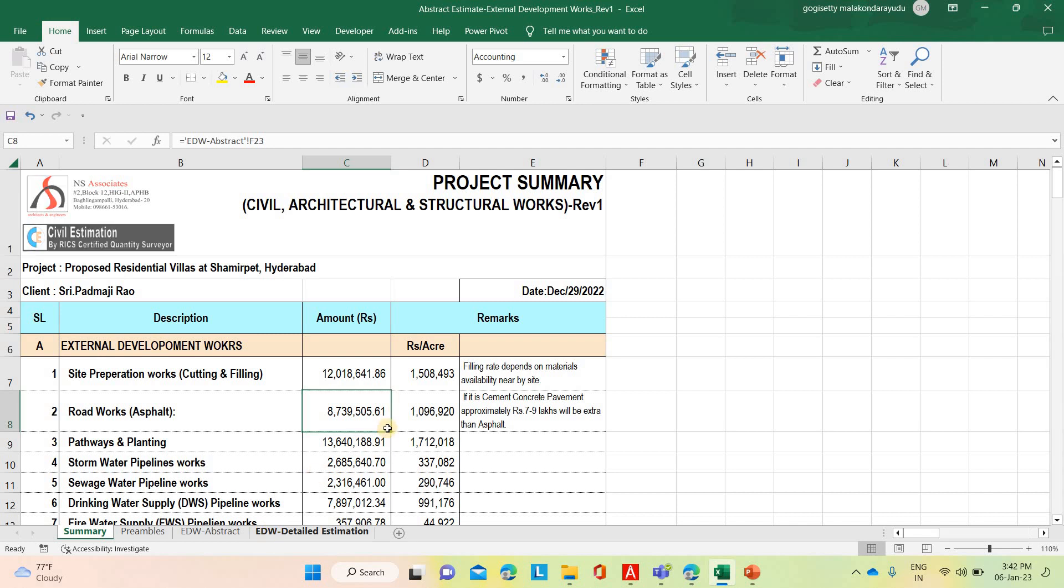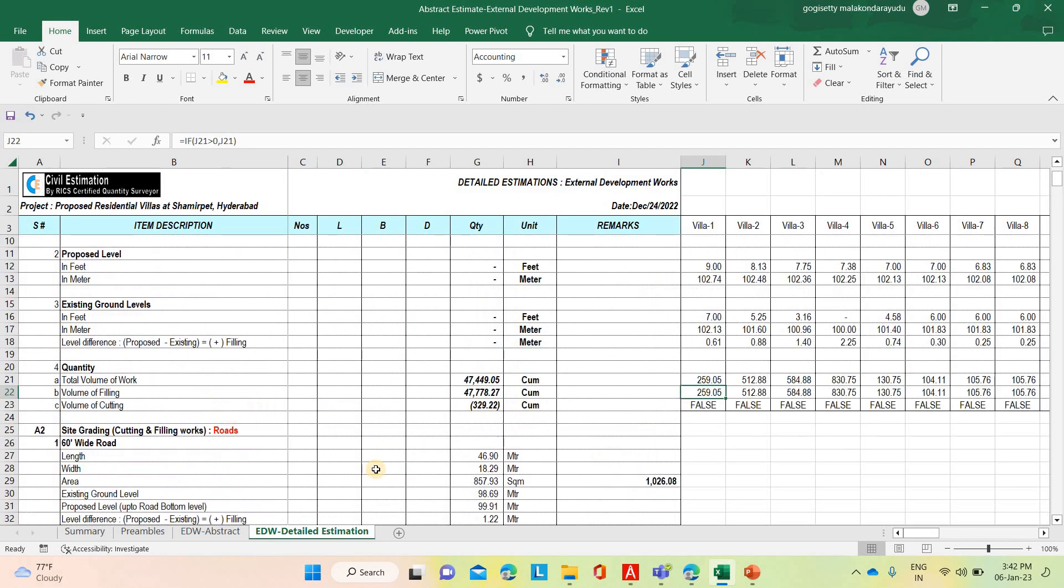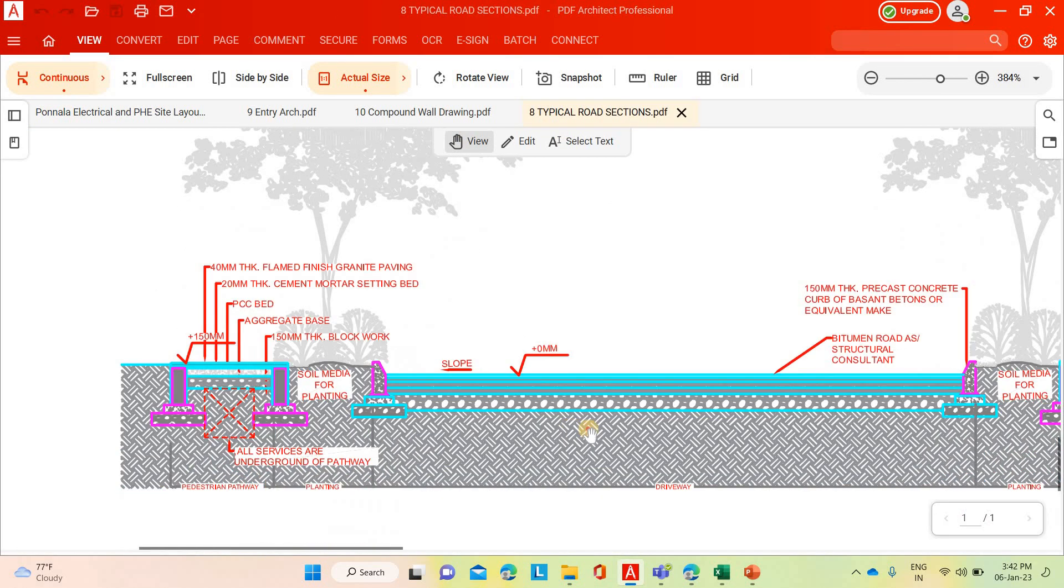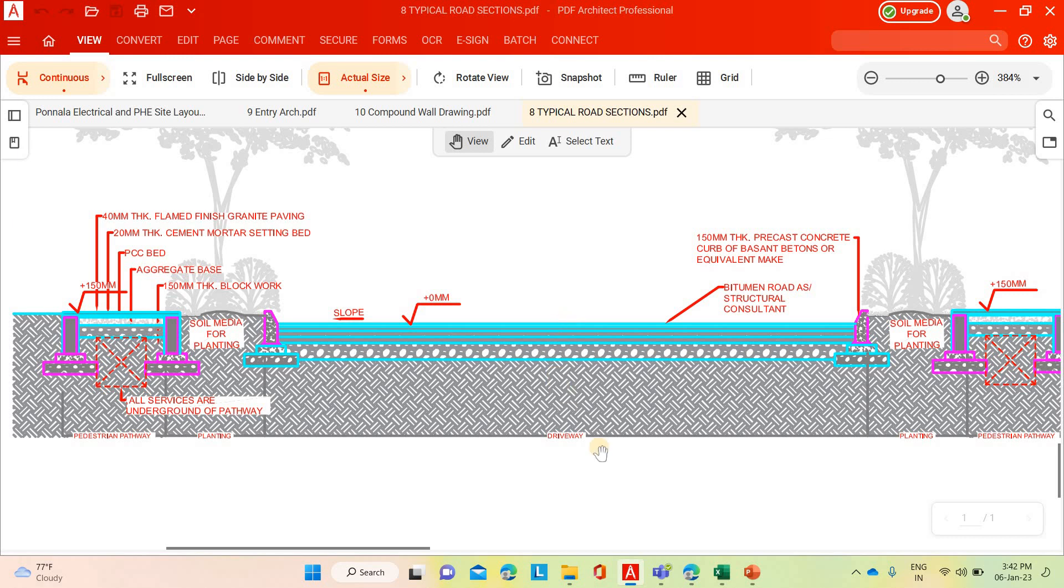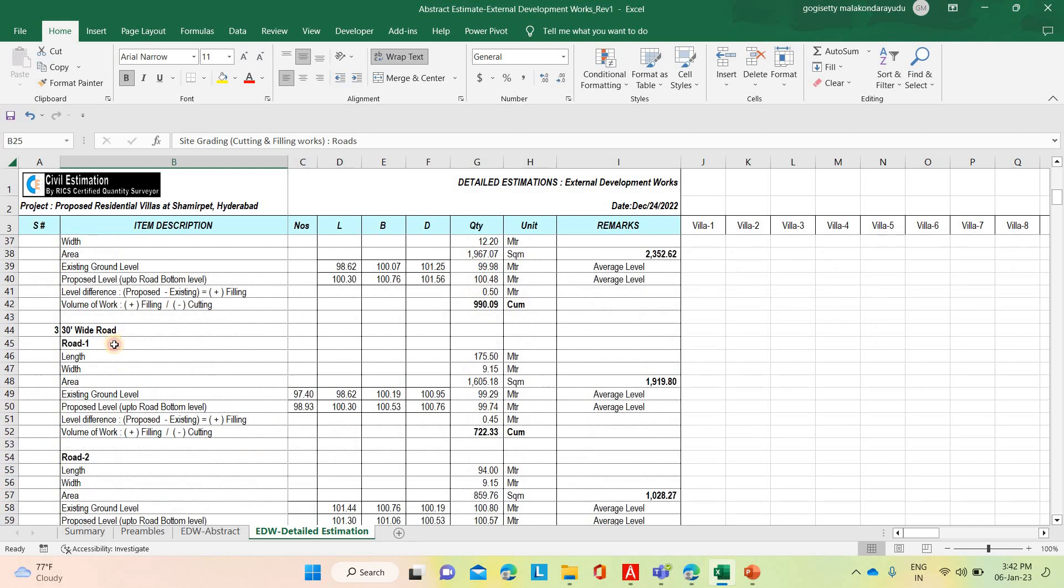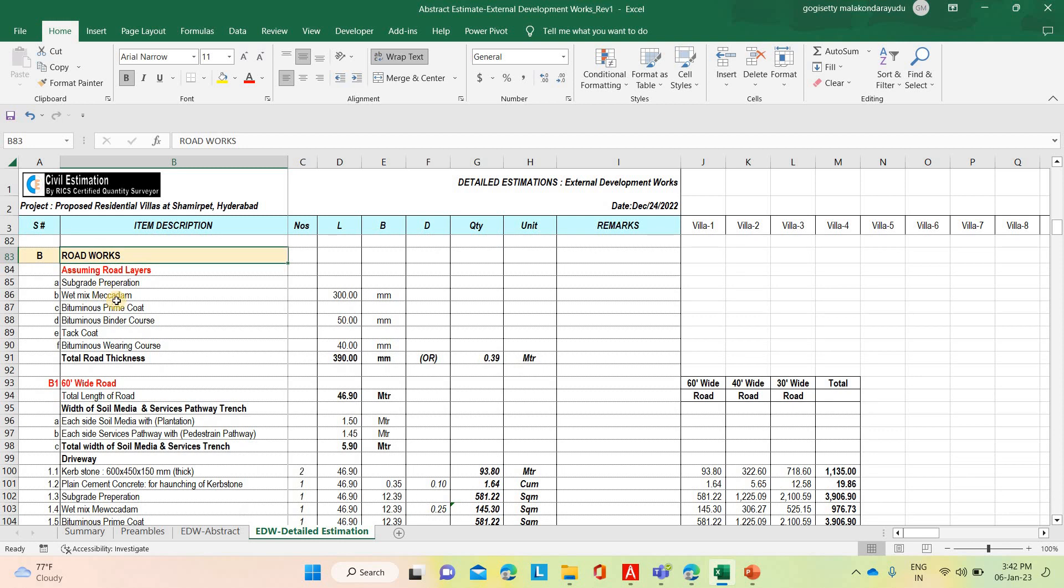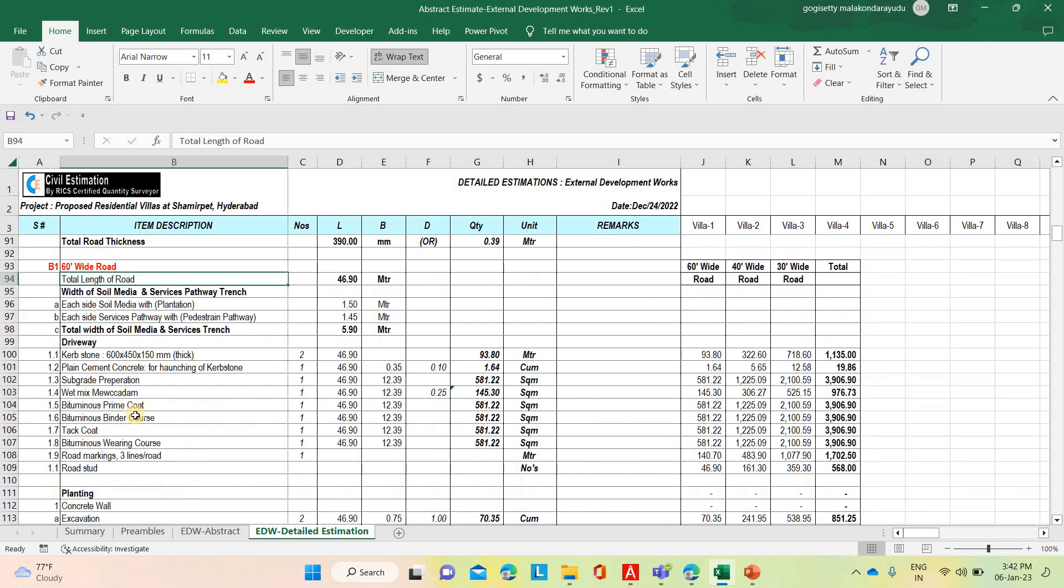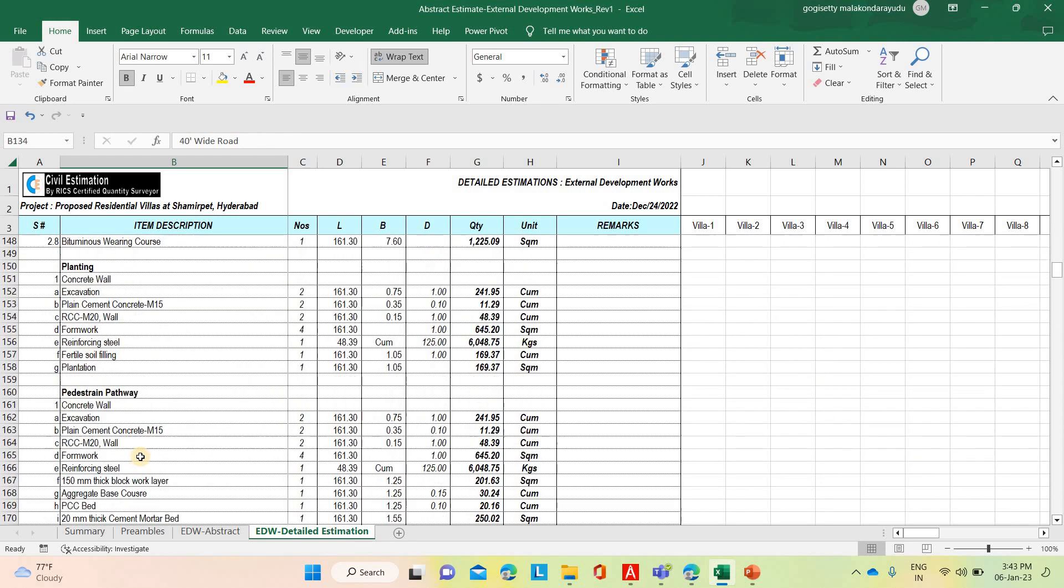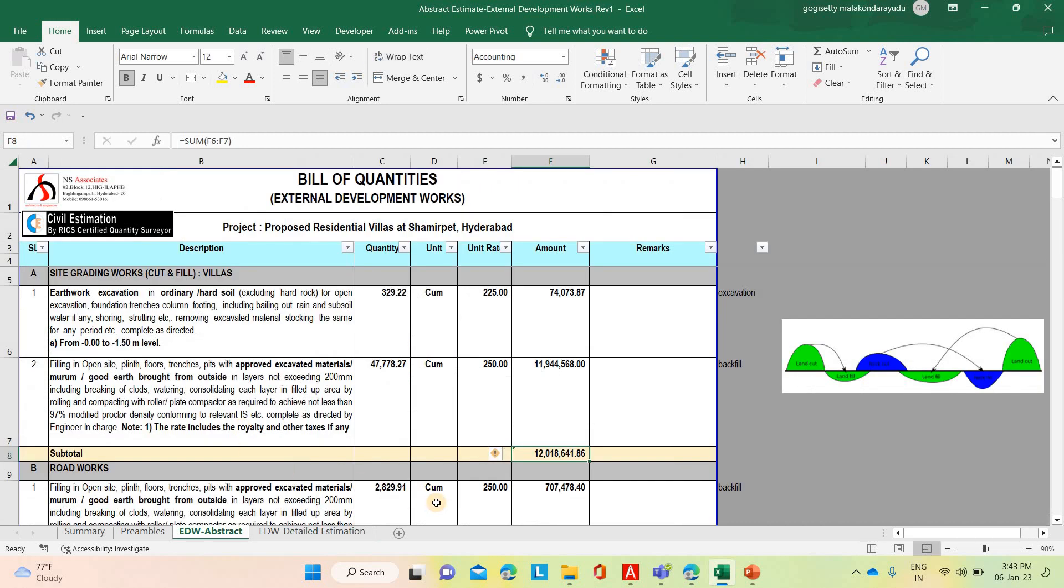Similarly road works. We have completed detailed estimation. In typical road cross sections, what are the elements are coming, it is mentioned clearly. Bitumen road as per the structural consultant, road base level, prime coat and bituminous macadam and tack coat and bituminous wearing coats, lane markings, road markings, directional arrows, rumble type, night reflector studs, everything we have estimated. 30 feet roads and total roads. These are the roadways we have considered. Subgrade preparation, wet mix macadam, bituminous coat, prime coat, binder coat, tack coat, wearing course. Based on that, 60 feet road and 40 feet road and the 30 feet road. What are the activities are coming, we have taken roadwork.